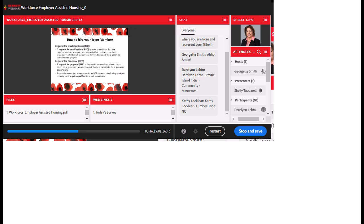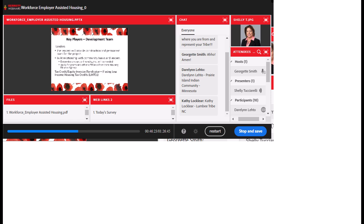If you are doing a low-income housing tax credit project, the other team member you'll be working with is your tax credit syndicator. Just like a bank, you want to shop around to make sure you're getting the best price for your tax credits. We budgeted 82 cents on the dollar but ended up getting 89 cents for our tax credits — the higher the price, the more money going in to fund your development. Start building that relationship with tax credit syndicators early.